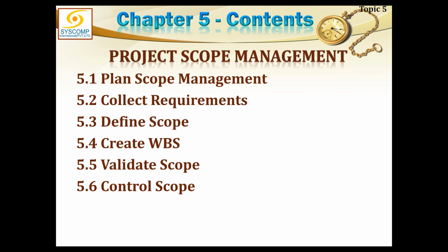So once I have the product scope and the project scope, and project scope exactly tells me how to do it. Now, digging a bit deeper into how to do it, I might have more than one way to do that job. I know what to make. I know generally how to make, but there could be about 10 different ways of doing this job. I am supposed to identify all those alternatives. If they are not known to me, I have to generate those alternatives.